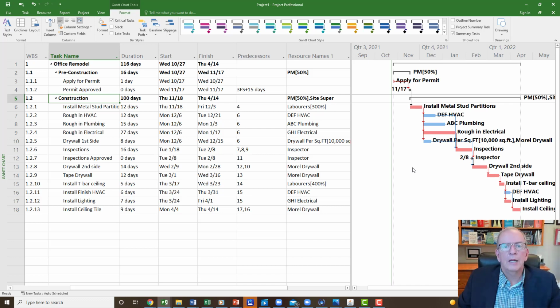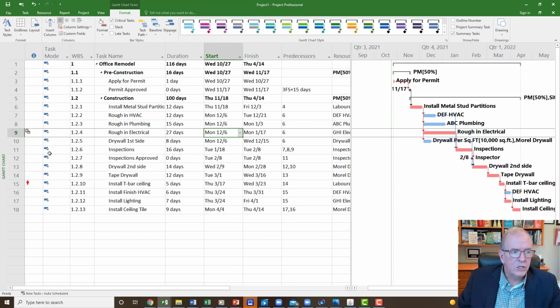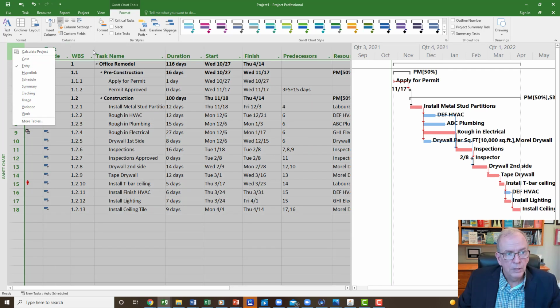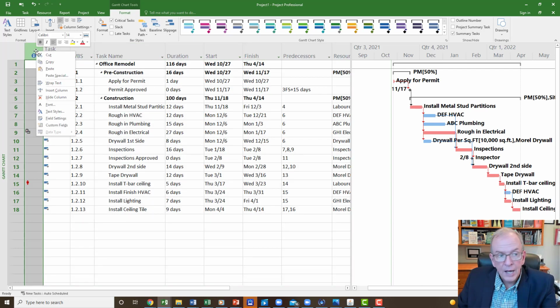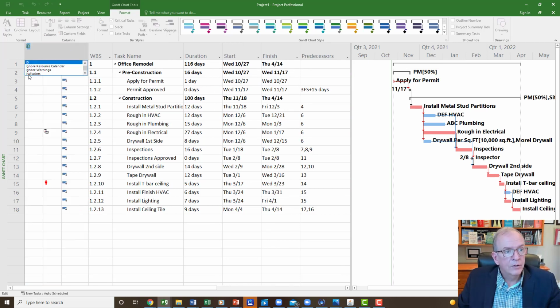Now the other thing that I wanted to show you today was deadlines. So I've told you in other videos, really do not get into putting constraints on your project. Try to avoid it. A constraint shows up on the indicator column. That's that nice little I column indicator, which you'll find on the entry view. You can insert it in any view, by the way. Right click, type insert column, and type I. It's under the indicators.